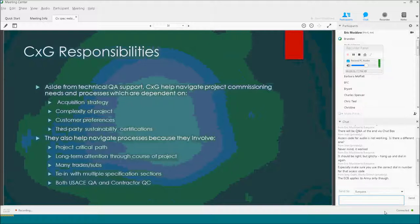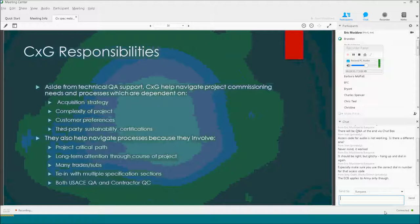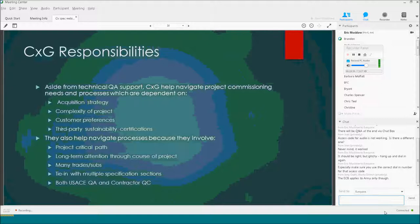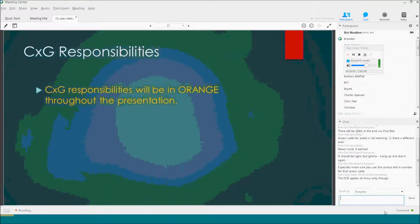There are many trades and subs connected with commissioning that makes this complicated. There are multiple specification sections that play into it — TAB, controls, HVAC specs — and some are prerequisites to others. Someone has to be aware of those and make sure we're doing everything in the correct order. When something shows up in orange in the slides, it's the Corps or government specialist requirements.